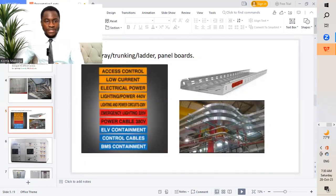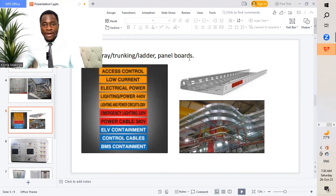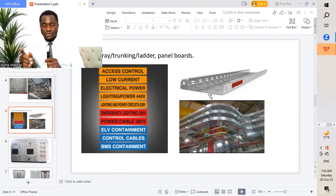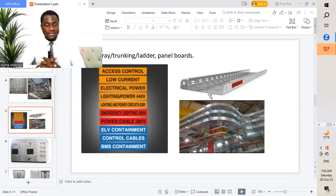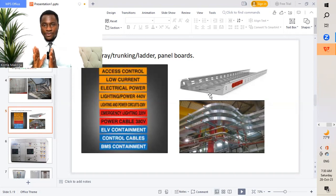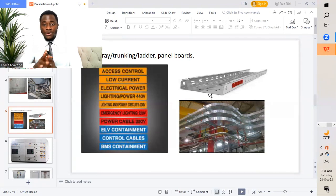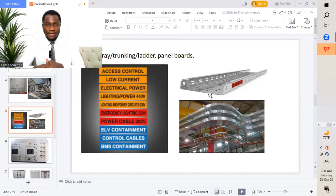I'll take you to the next slide, which is cable tray, trunking, or ladder panel boards. For conduits, like I did mention, we'll have different color codes — red, yellow, purple, orange, blue, white, and so on. All these different colors will be identified based on the different services installed in that location, and this should be submitted to the consultant as a meta statement. They get to identify and know that this particular color is for this service; they approve it prior to proceeding on site, so we don't have discrepancy with different installations compared to the meta statement, which is very important.